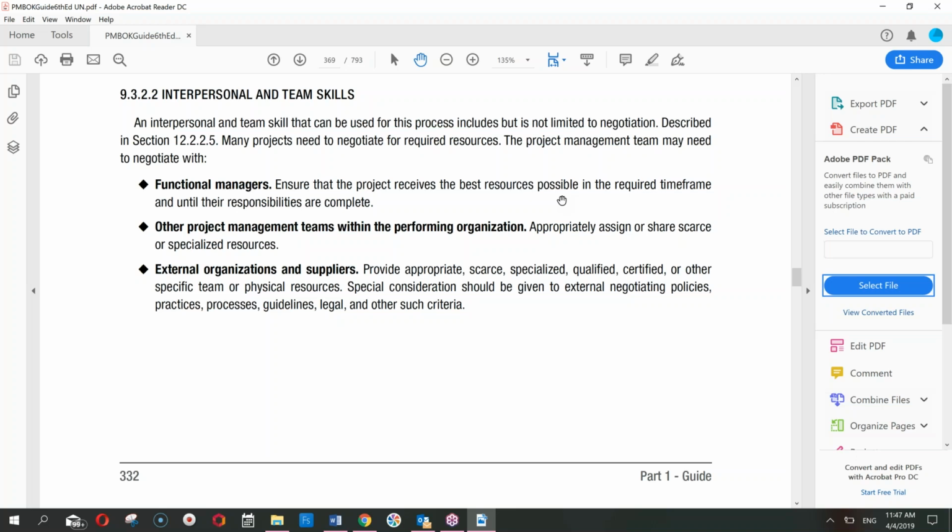Yes, of course, we can always rely on them as far as the facilitation is concerned, helping us, supporting us. But at the same time, you must be in the driving seat when it comes to deciding on which resource you are inducting in your project. If HR has suggested some resource which you think is not suitable, you must refuse. What strategy they use is, normally they give you the resource at the very last moment, and then you don't have time to refuse. So better ensure in your schedule that this selection process happens much earlier.